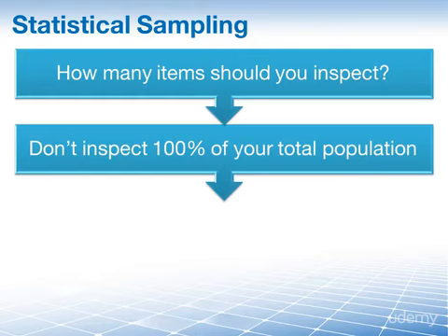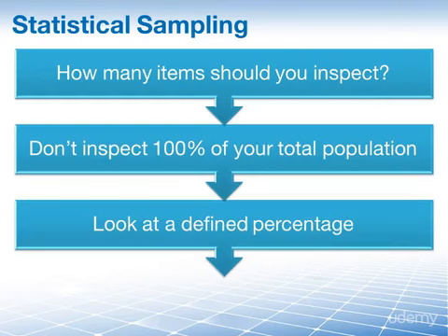This is because it's usually enough to look at a certain percentage to come to an overall conclusion. This percentage is often specified as a sampling frequency or a sampling frame in the quality management plan. The goal is to define a sampling frame which will give us a good representation of every single element of our result. For example, if we are producing 1 million pencils, then we will not measure every single pencil, but only every 100th pencil that comes out of the machine.